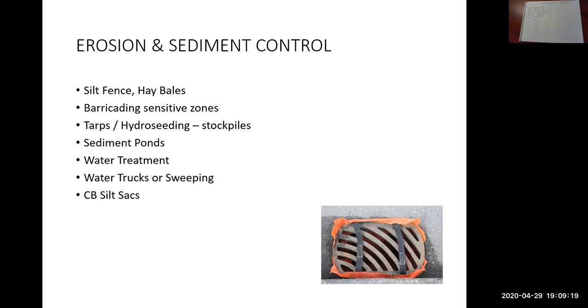Sometimes you're required to have a water treatment system. Water that's potentially leaving the job site that could be dirty, you're directed to treat that dirty water with a treatment system. Again, that equipment you typically rent, and again, it costs money. So you want to allow for those costs in your estimate.